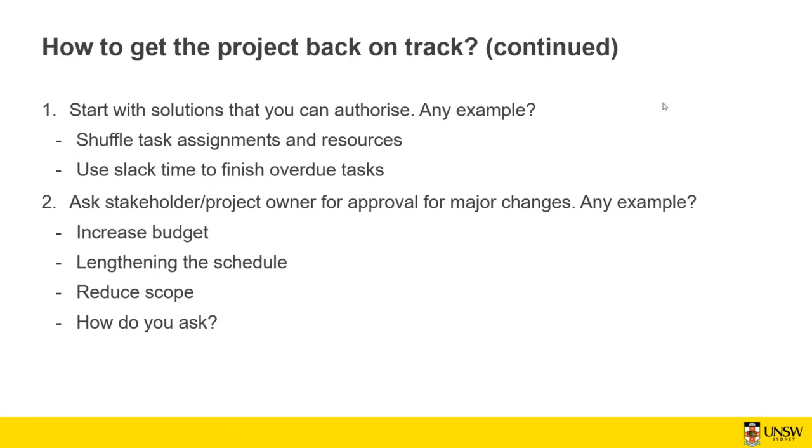So one question, what is the difference between the planned value and the budget at completion? Okay, so the planned value is the amount of the budget that you plan to spend at each stage of the project. So it has started from the starting of the project until the end of the project. But the budget at completion is a cumulative of all those planned values. So by the time that you reach the end of the project, this is the amount of money that you plan to spend. So this is the budget at completion. I hope I answered your question.